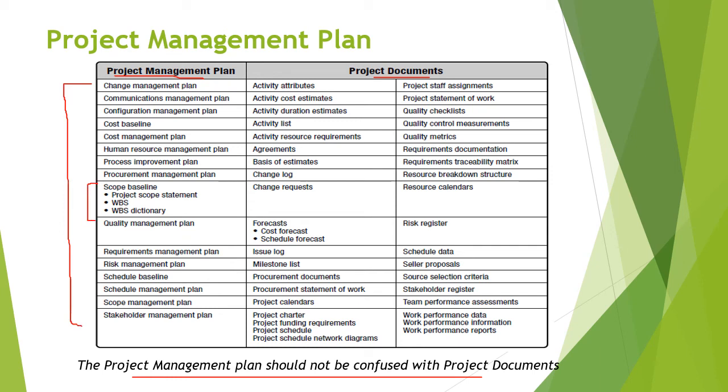Please remember, the project management plan contains all the subsidiary plans and the baselines. On the other hand, project documents are all other documents that are created during the project, right? Be it the list of activities, any agreements, any basis of estimates, any change logs, change requests, forecast document, any kind of quality checklists, quality metrics, requirement documentation, risk register.